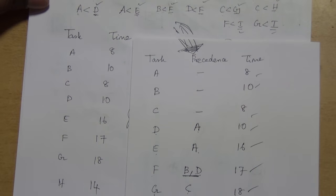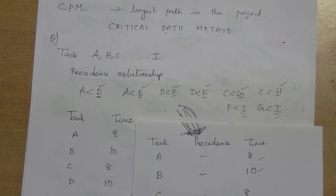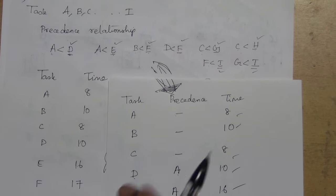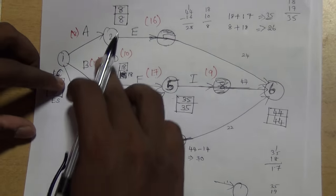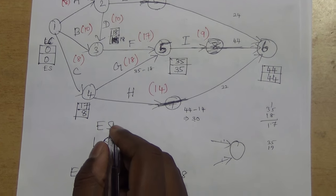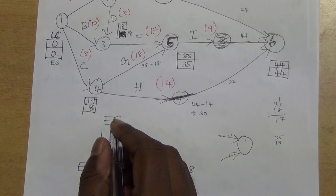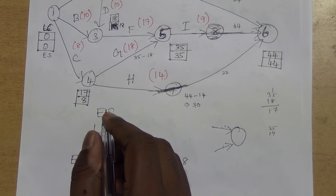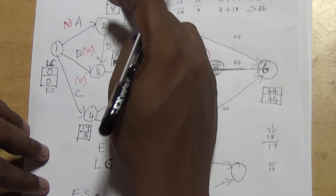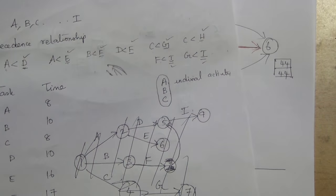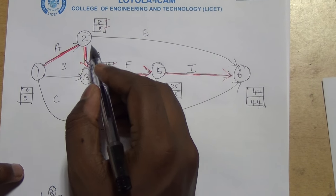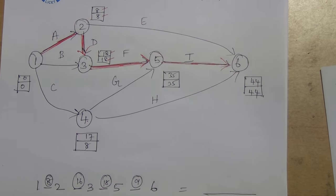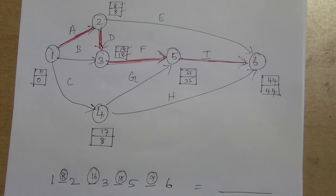To revise: we were given a precedence relationship, from which we identified predecessor data, drew the network diagram, calculated earliest start time and latest completion time. Using these values, if both upper and lower values are same at a node, we mark it as part of the critical path. Starting from the first node and traversing to the end gives us the critical path and critical length.